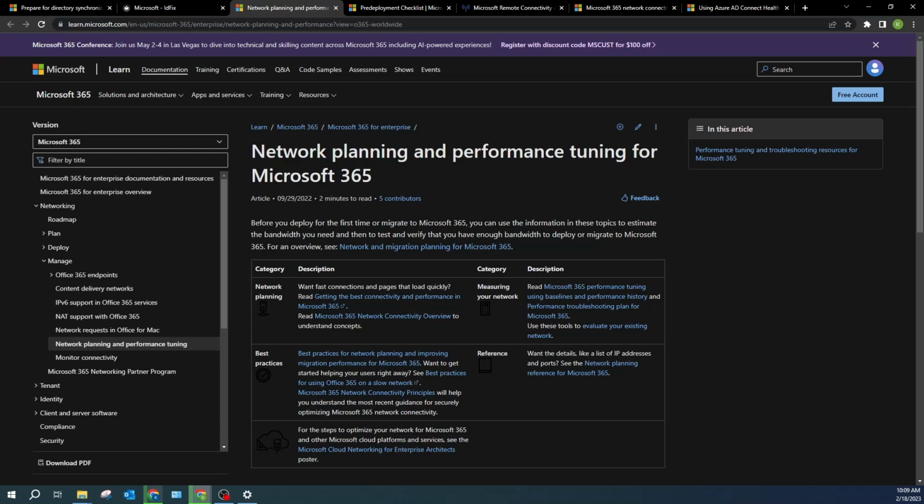The checklist includes tasks such as determining deployment goals and agreeing on scope and timeline with internal and external stakeholders, inventorying the current environment, collecting information on user accounts, mailboxes, client versions and configurations, network settings, file storage locations, intranet sites, online meeting and instant messaging systems, and any application that works with existing systems.